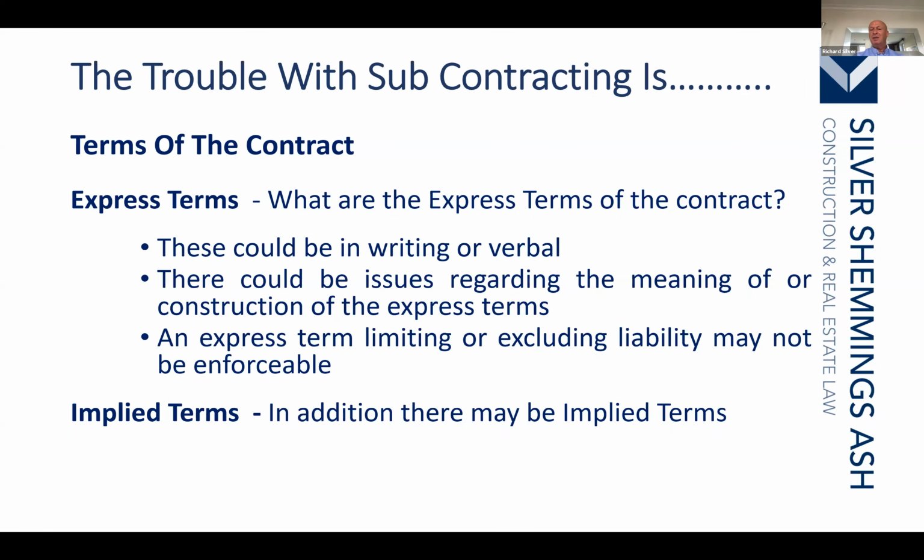and statute would be an example of the Construction Act. If I have a subcontract that says the Construction Act will not apply, that is contrary to what the Construction Act says. And therefore, under the Construction Act, the scheme for construction contracts is imported. I have an obligation, if I'm carrying out works, to carry them out in accordance with building regulations.